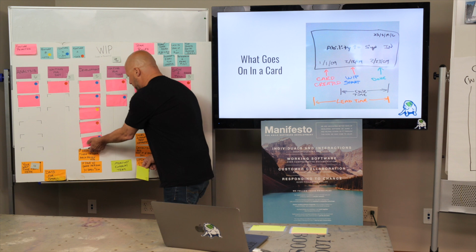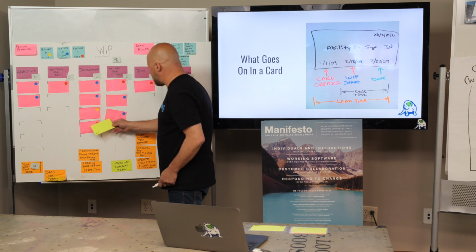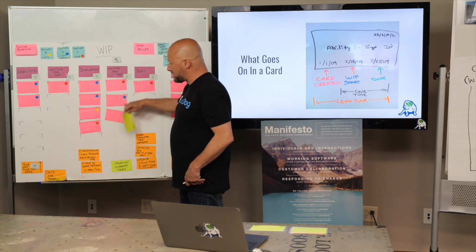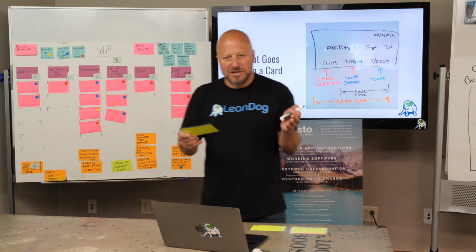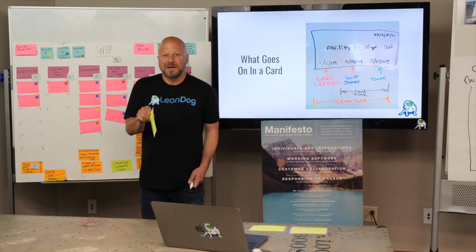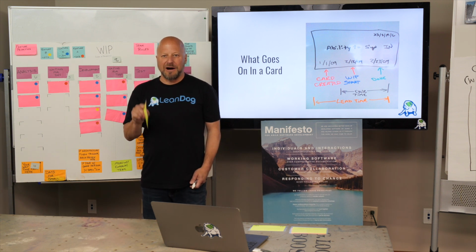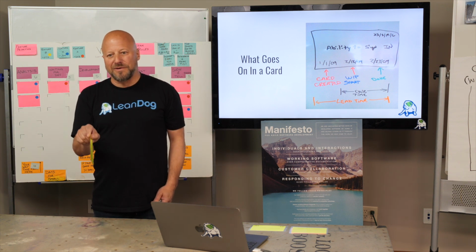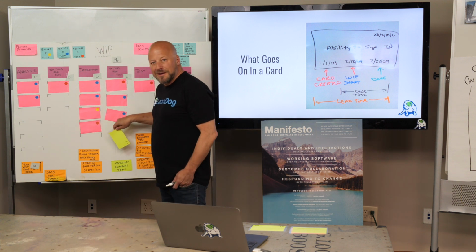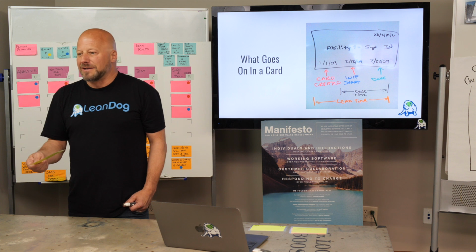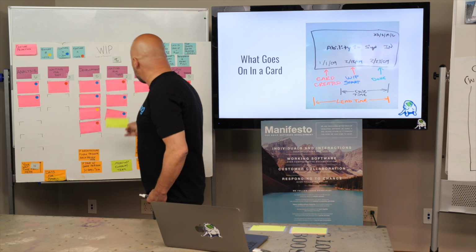And like, what happens over here? Like, what happens if we would have kept throwing these cards over here, and now the tester has to test something, and I go and I say, hey, Josh, I have a defect, and it took me 2 weeks to find that defect. You're going to say, God, I wish you would have told me within the hour or 2 hours that I coded it. So because my head was in the code, it's complex, right? So it's going to be cheaper for me to fix that if I reduce the delay, because now I have to go back and relearn the code and remember what I did and how to fix it. And so we're just driving cost up, right? We're actually driving this delay up.